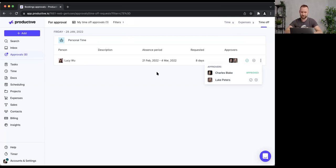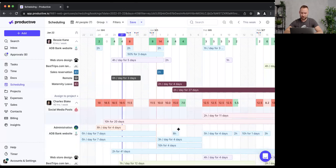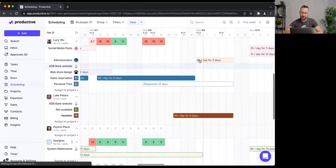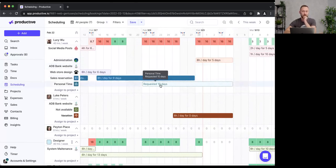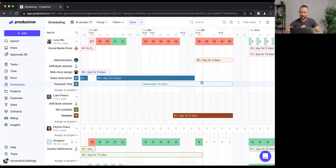Let's go back to project planning to see how time off affects scheduling. Lucy has requested 10 days off, and I can see a conflict — she's also scheduled to work on the 'Office Management' project. I should either move that booking to someone else or decline the time off request. This is how project planning and time off planning work together.